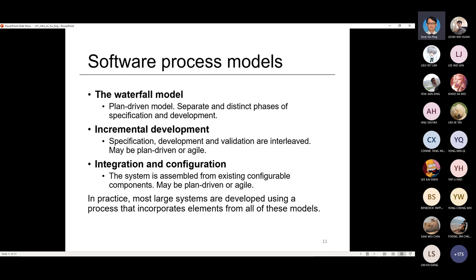Okay, so incremental development is suitable for small scale or medium scale projects. And this project is usually deployed incrementally. Incrementally here means in each of the phases, you are going to come out with several versions. And these several versions, you keep enhancing and improving based on the customer's comments. The customer certifies it, okay? Only then do you move to the next phase. So in each of the phases, you might notice you will go through many different versions, and these versions try to enhance the customer requirements. Usually with this kind of method, you should be able to deliver the system faster.